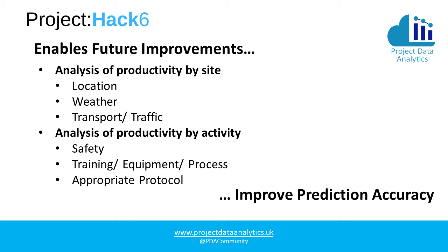And in particular, you want to be looking at the analysis of productivity by site and by activity. If we look at productivity by site, we might be interested and concerned about things like location, weather, transport, and traffic. That sort of thing is available from external data sources, which can be integrated into these visual reports. Likewise, with activities, we might be looking at productivity by activity based on safety events, on training, equipment, or processes that we use that are different at various sites. And we might also want to examine whether we're using appropriate protocols, such as underwater protocols, or fire safety protocols, or road safety protocols, those sorts of things.